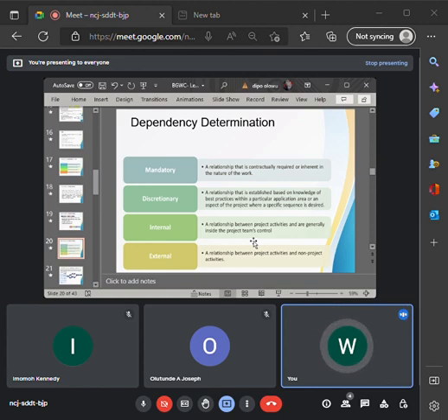External dependency is when you consider the external factors. External factors in this context are not your own main team, which means other factors outside your team, like the regulatory bodies. It will take time for you to get clearance from the port because of their back and forth. Before they give you approval, it can take 3 weeks. You now say, okay, while we are waiting for that task, let's perform another task. Or maybe the supplier, because what you have ordered needs 1 or 2 days before they get to you, or the distance. They have to travel through the road, or they have to use the sea. External dependency, you have to consider those external factors, or the vendors you are bringing on board that are not part of your team. All right, do you get that now?